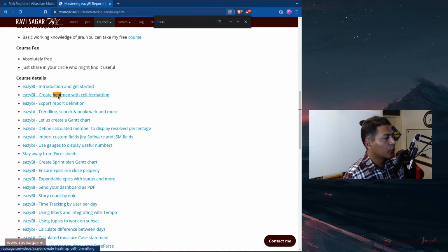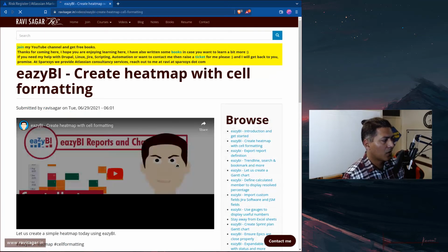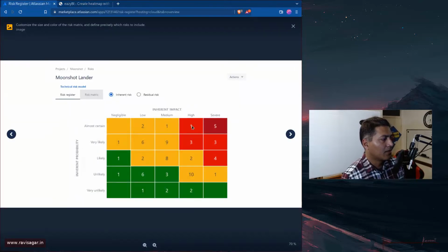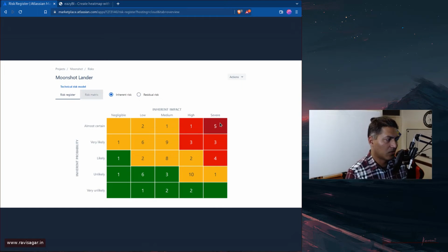So basically what you can do is create some kind of a table, like I talked about in this video. Then, based on these two field values, you can calculate a number like your risk, and then highlight it. If it is more than 4, then use a color.